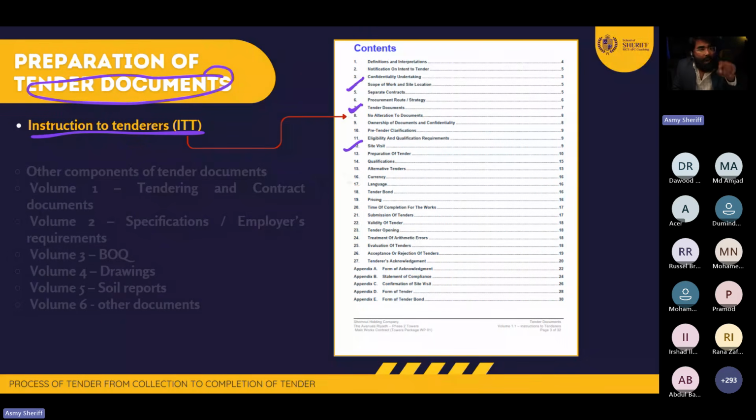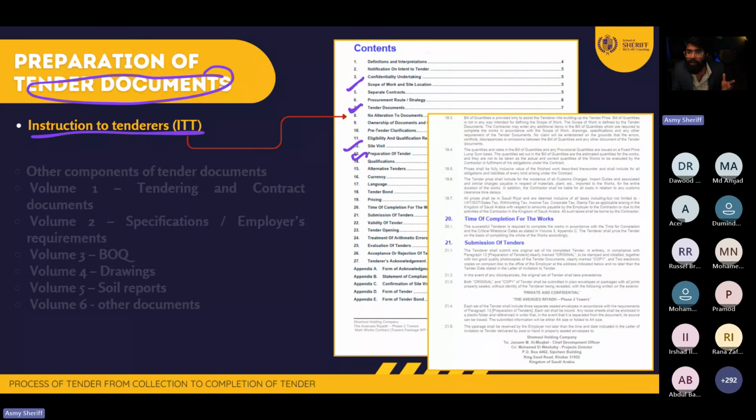So if you have such an issue, how are you going to contact us? Do you think you need to tell all this information to the person who is going to come and price for you? Of course. And also you need to tell the guy, after you complete it, okay, we will give you 3 weeks for you to price the document. And throughout the period, if anything, come back and ask us. This is the procedure you need to follow if you want to ask anything.